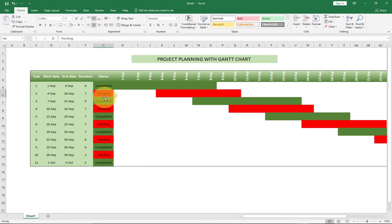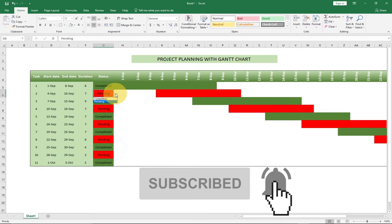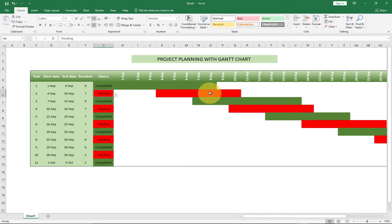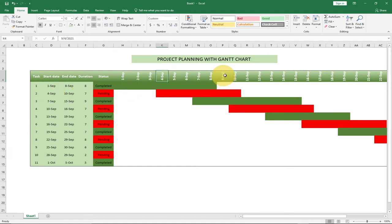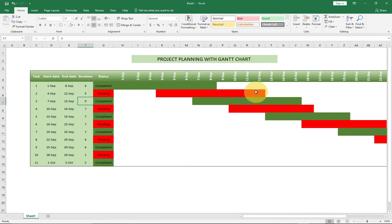When we change the status from pending to completed, it's going to update accordingly and the bar is going to change to green. If we change it back to pending, it updates to red. If we change the duration — for example, starting from 4th September ending on the 10th September — that's a duration of 7 days. If I change this to 9 days, it's going to update the bar accordingly. This is basically very interactive.